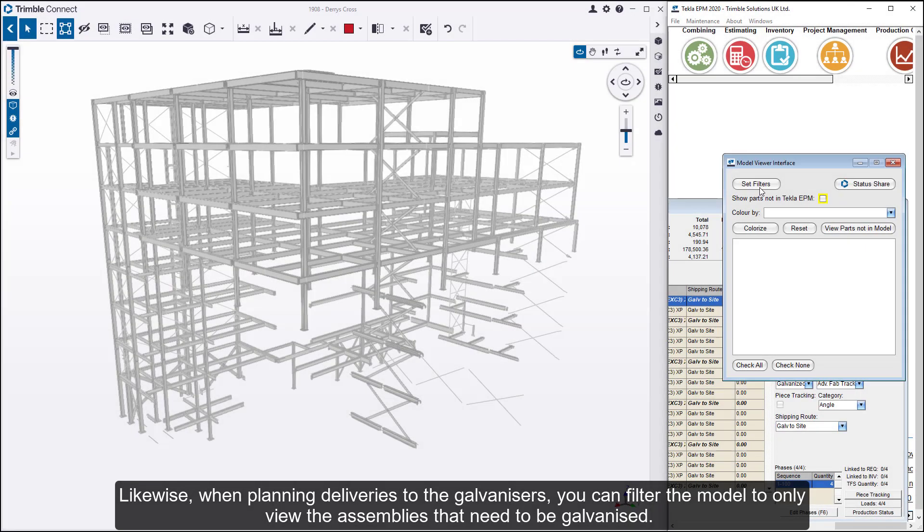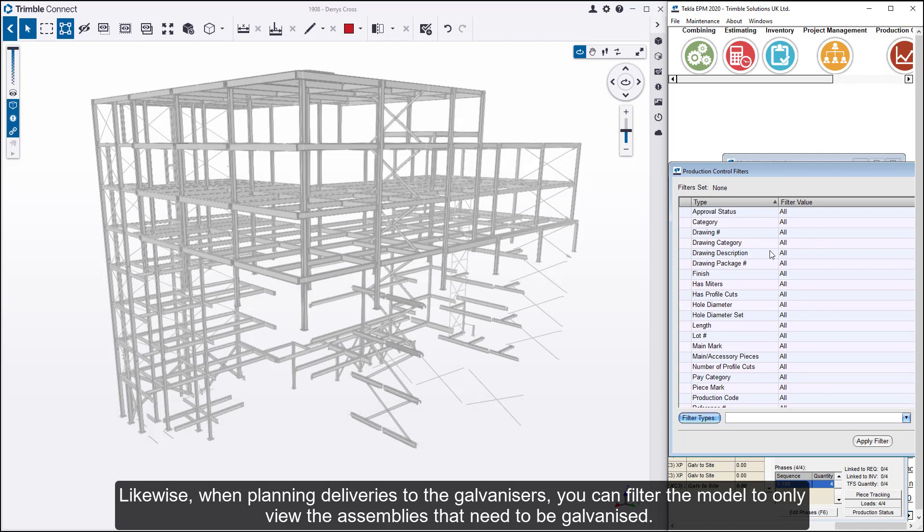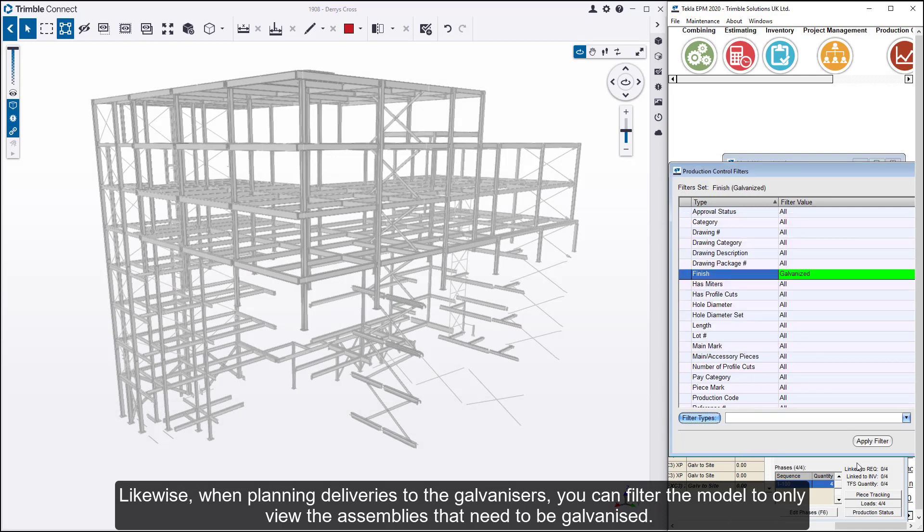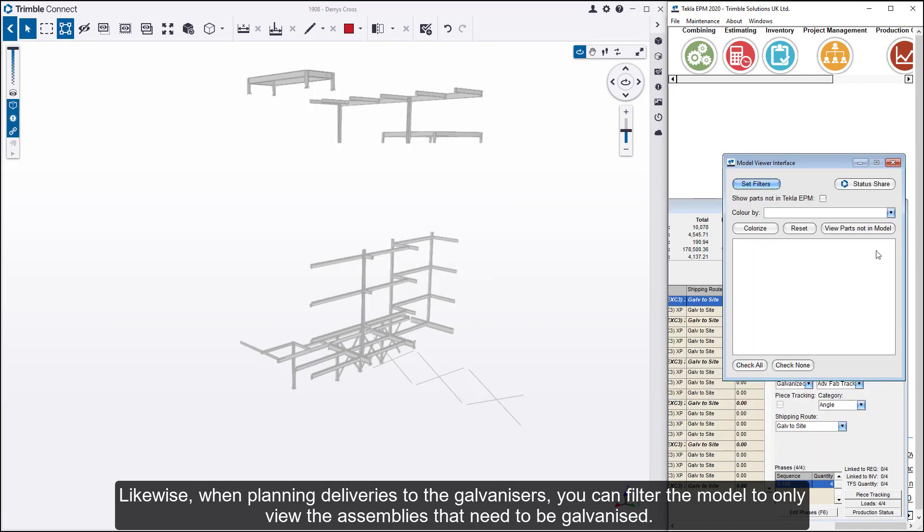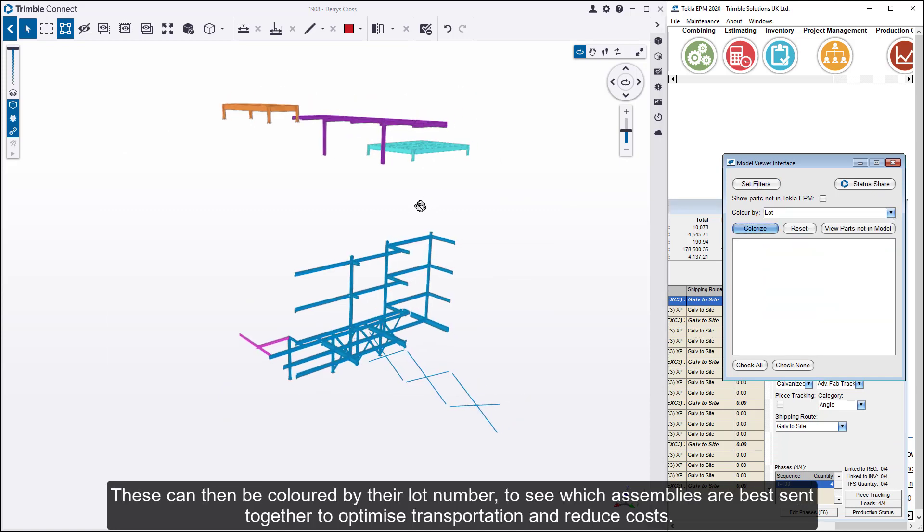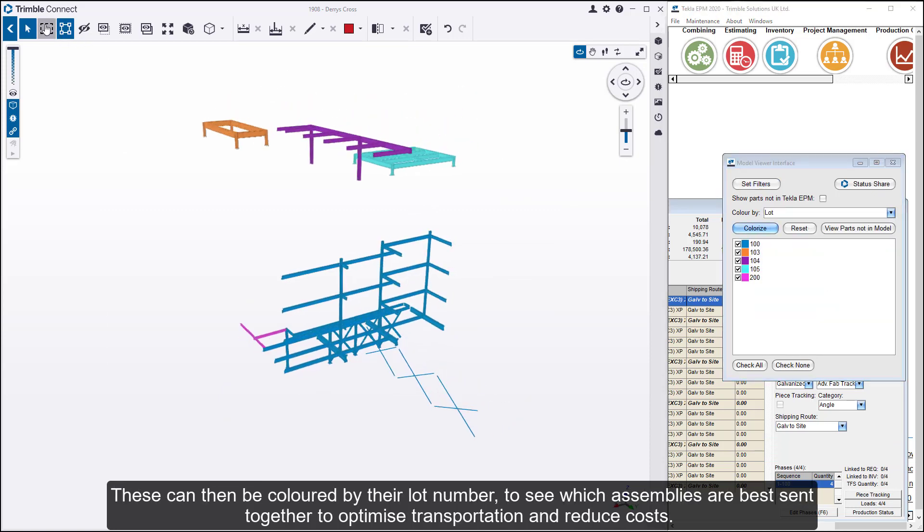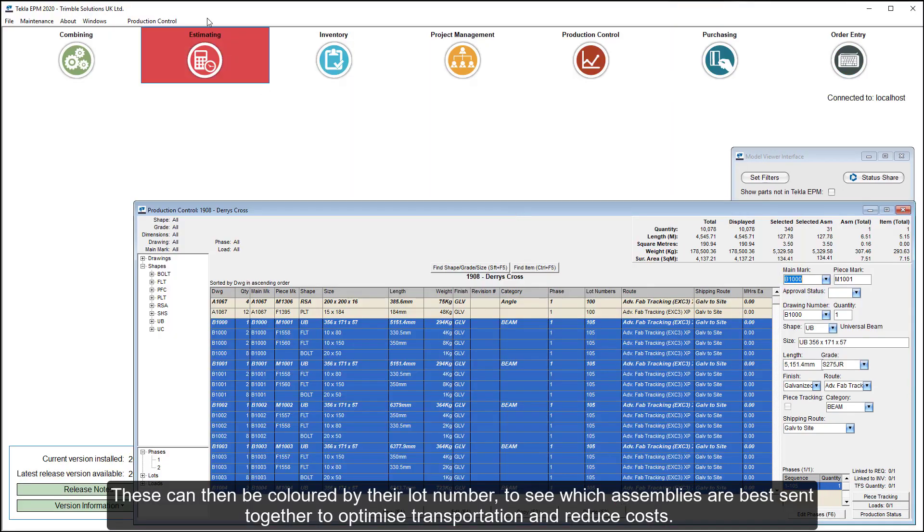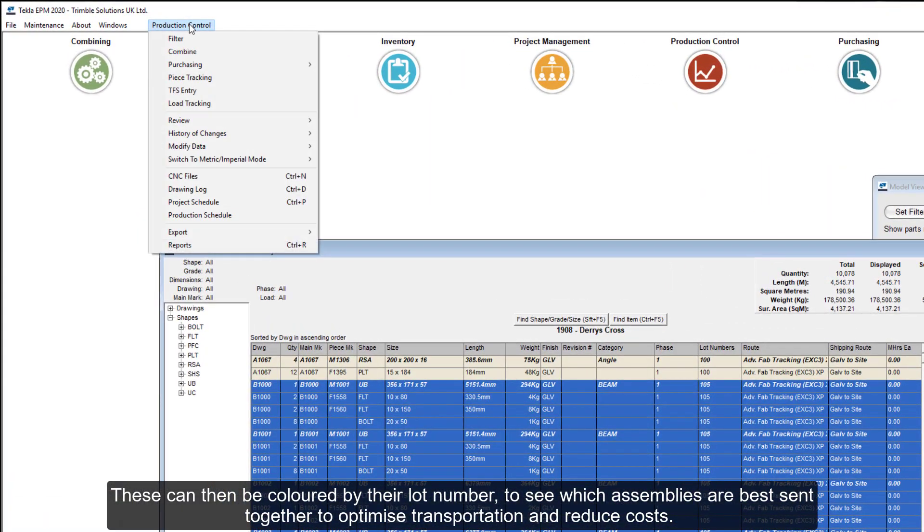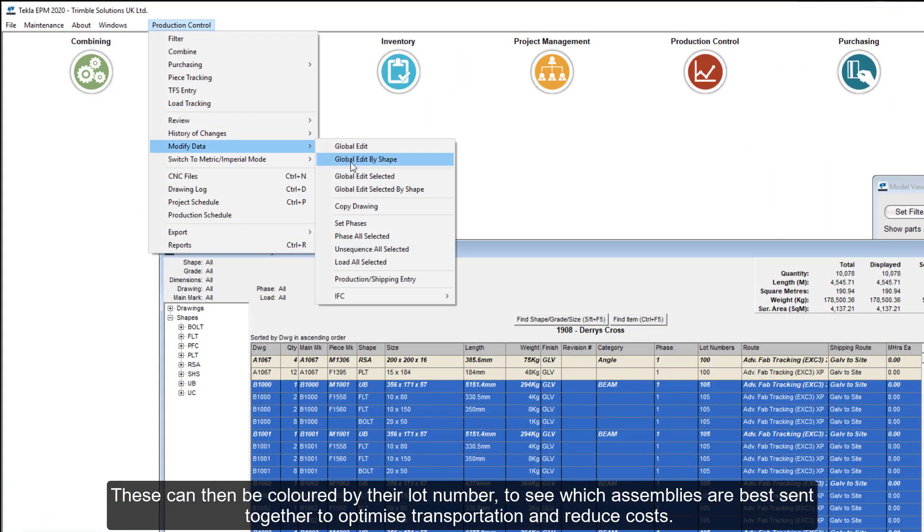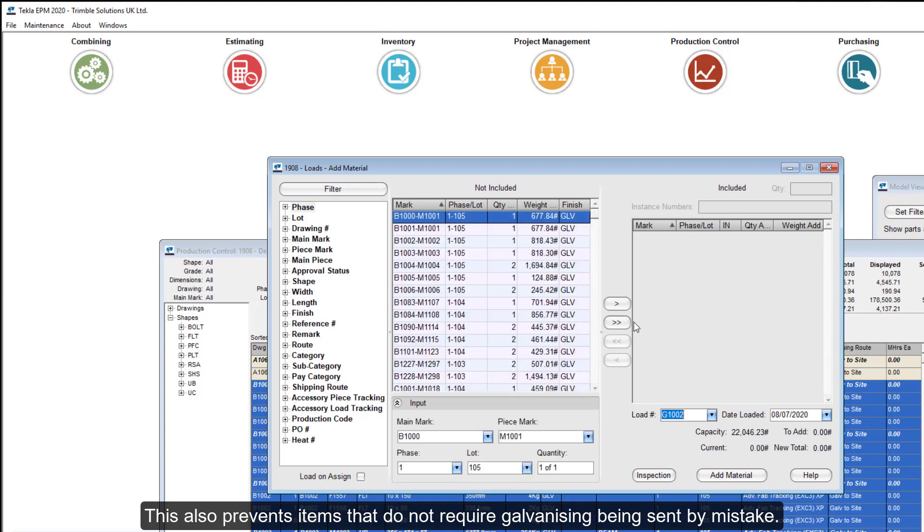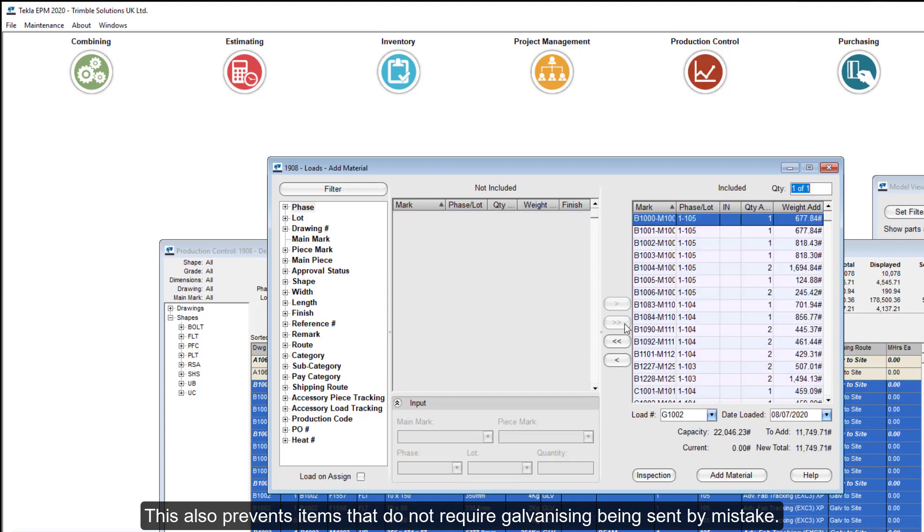Likewise, when planning deliveries to the galvanizers, you can filter the model to only view assemblies that need to be galvanized. These can then be colored by their lot number to see which assemblies are best sent together to optimize transportation and reduce costs. This also prevents items that do not require galvanizing being sent by mistake.